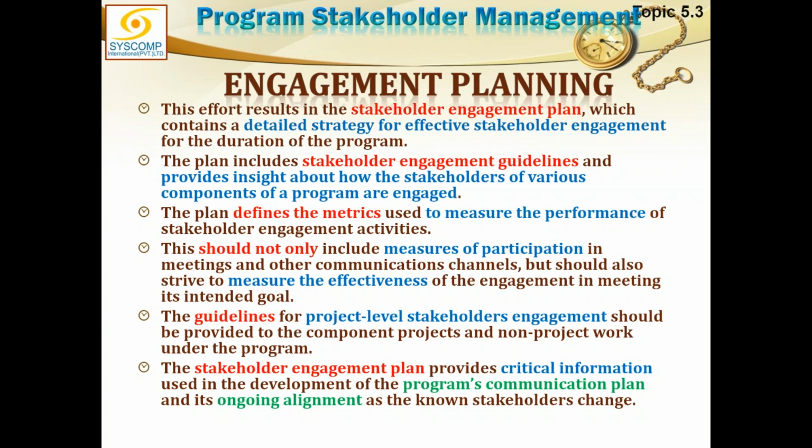Then we have the guidelines for project level stakeholder engagement, which should be provided to the component members, component projects, and non-project work under the program. The stakeholder engagement plan provides critical information used in the development of the program's communication plan.